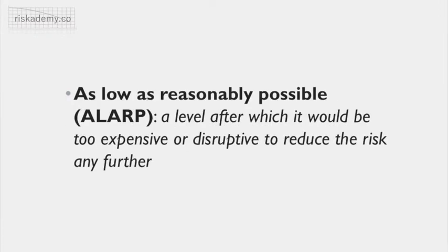As low as reasonably possible defines a level after which it would be too expensive or disruptive to reduce the risk any further. In other words, from a cost-benefit perspective, the cost of any additional risk mitigation measures don't justify the benefits.